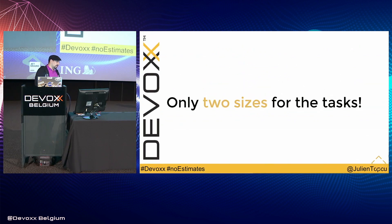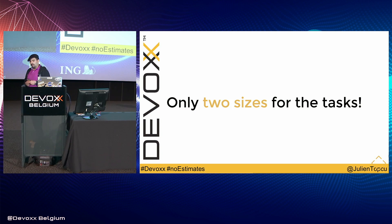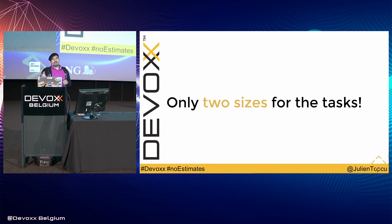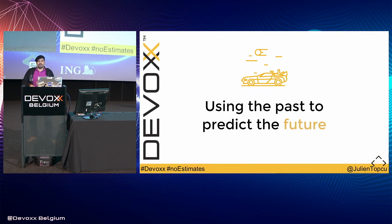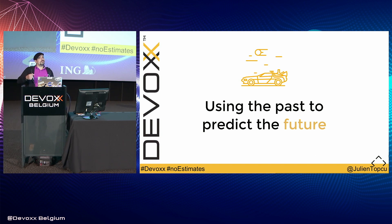Now we can measure something called the throughput — the number of tasks delivered each week. If you're delivering five tasks a week and have a backlog of ten tasks, you can say you'll finish in two weeks. But we know we'll do a bit more or a bit less — usually less. So how can we simulate that evolution of cycle time? We use something called the Monte Carlo method using Bootstrap, which uses the past evolution of cycle time to predict the future release date of our backlog.